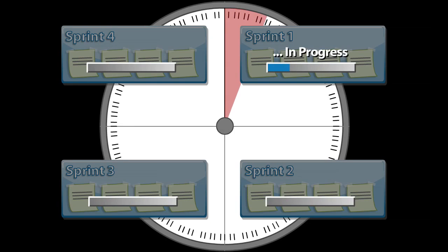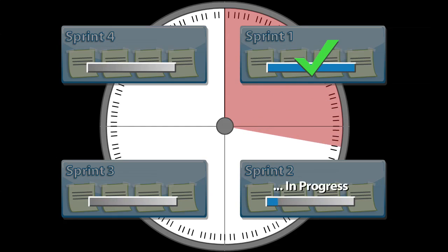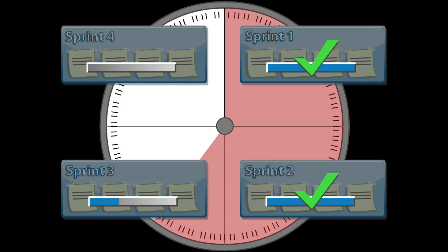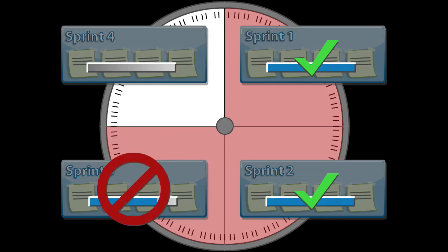One of the most important things to remember about sprints is that the goal of each sprint is to get a subset of the product backlog to a ship-ready state. So at the end of each sprint, you should have a fully tested product with all the features of that sprint 100% complete. Since sprints are a very short but a realistic representation of part of the product, a late finish of a sprint is a great indicator that the project is not on schedule and something needs to be done. Therefore, it's extremely important to monitor the progress of each sprint with this, a burn-down chart.